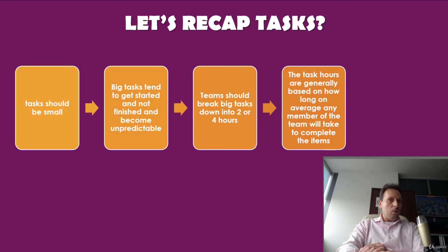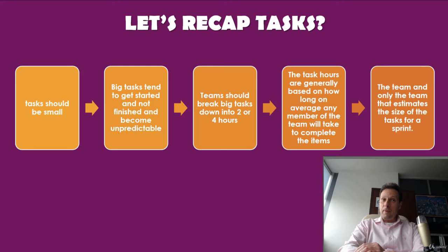The task hours are generally based on how long on average any member of the team will take to complete the items. It is important to note that it is the team, and only the team, that estimates the size of the tasks for a sprint.